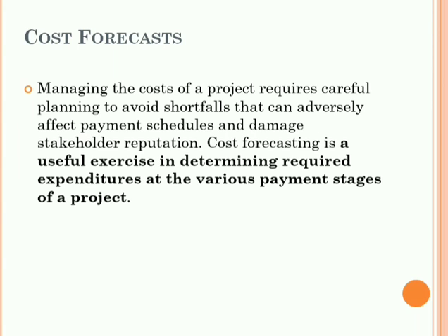Cost forecasting is a useful exercise. Let us see the definition of cost forecast. It is a useful exercise in determining the required expenditure at the various payment stages of the project. The project cost forecasts are generally developed and issued from the commencement of the project until the project close out. Okay, the frequency of the cost forecast can vary from monthly, quarterly, or only at certain key milestones of the project, like completion of the design, then midway of the construction, etc.